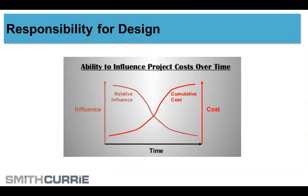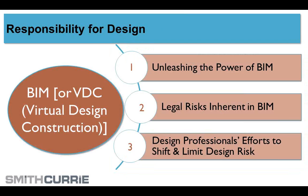And that's what this little simple chart is trying to show. That your ability to influence cost and time diminishes over time. So if I'm advising an owner, I say you really want to get your contractors in early. I mean, sometimes designers design to the lowest common denominator. They provide more electrical power than you really need because they don't really know what you really need. And they provide more capacity in various other areas, which is sometimes what leads to value engineering. Imagine if instead of doing value engineering on the back end, trying to get it within budget, you got that input on the front end, so the thing was never over-designed in the first place. So that's the idea, and there's clearly benefit.